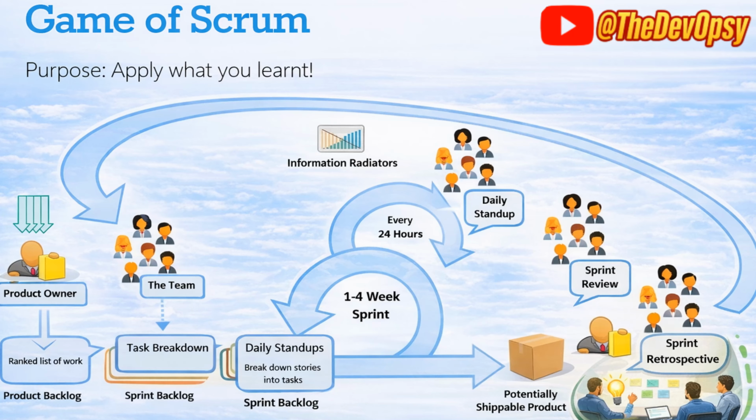You take the sprint, you run the sprint, you do the daily stand up, you do the sprint review to the stakeholders, get action items from them. Then you do the sprint retrospective. Usually the sprint retrospective is done on the last day of the sprint to make sure that we have inculcated everything.